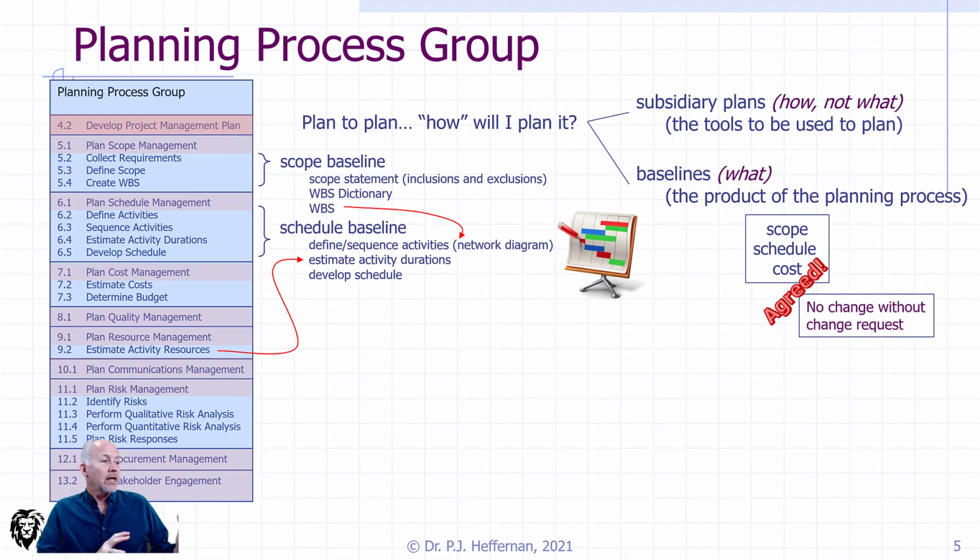And so all of that has to happen, but it's going to be happening iteratively. Your first schedule likely will not include any resource implications, and we're going to look at resources as a further refinement to that and start to make the Gantt chart look more like it's going to carry us through to fruition.